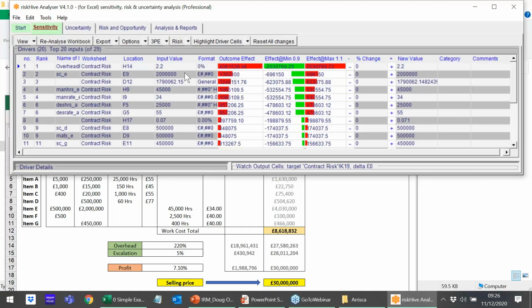Yeah, so people start off with good intentions when they've got lots and lots of inputs to put distributions around. But in my experience, more often than not, if you've got a lot of stuff to do, it ends up as a checkbox exercise. What I used to see all the time is people make everything a triangular distribution and add plus or minus 20% to everything, and great, we've now completed our Monte Carlo exercise, and who cares whether the results are accurate or not?